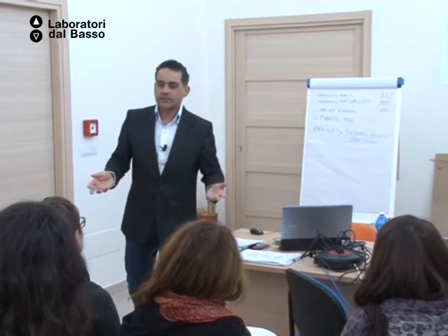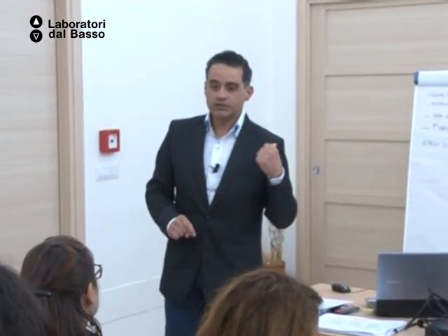Most of the time when I'm ready, I already know my project costs, for example, 575,000 euro. So when I have my first draft and my first budget, I already know that I'm over for this program. So either I look for another program, such as, for example, EuropeAid, which is cooperation, or another one. Or I say, no, this is too much for a Grundtvig multilateral project. So let's be less ambitious. Let's cut the project in 2 projects. The first one this year, the second one maybe next year.